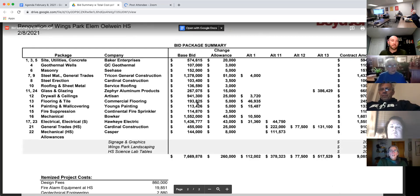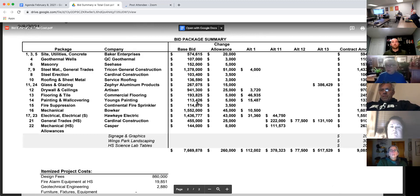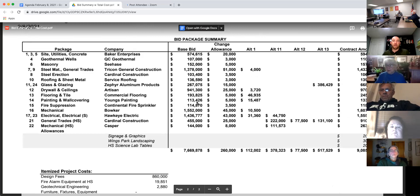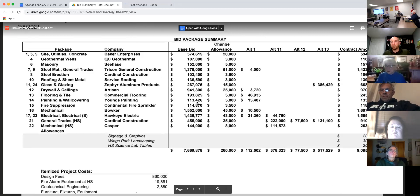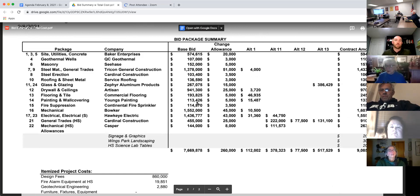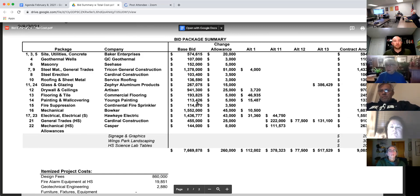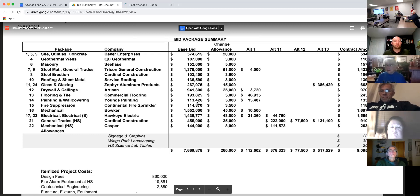As we go to the next sheet, these are all of your successful bidders. And I do want to say that I've gone back and I've talked with each of these companies to verify that everything is good as far as their performance and payment bond. They agreed with the scope documents that were out. So everybody with their base bid amount and any alternates that are accepted is okay going forward with their price. I did want to point out a couple of things that broke pretty well in your favor.